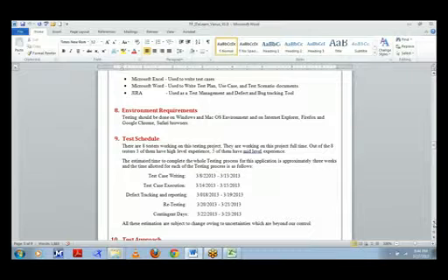For test case writing, I think we gave 5 days, whereas test execution is 2 days, and for defect tracking and retesting, contingent days, we kept 2 days. So these dates might change according to the resources available and other uncertainties.